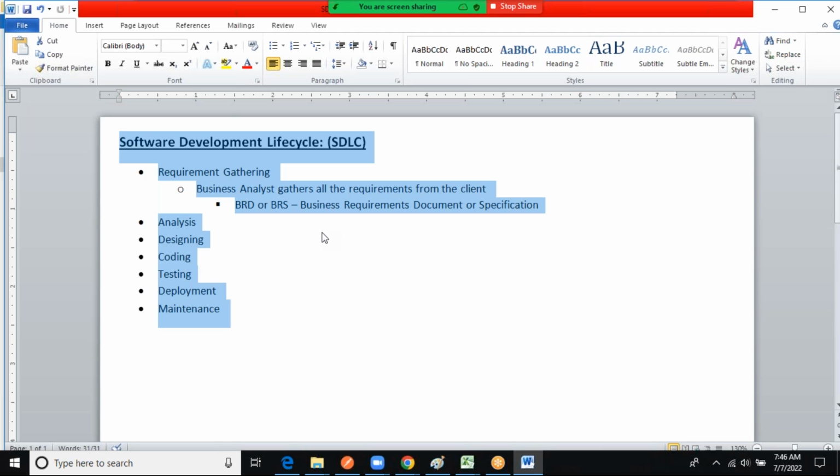If you are following the agile model, you will be working cycle by cycle, and each cycle is called a sprint. The sprint duration will be 2 to 3 weeks. Consider you are working for 3 weeks. In 3 weeks of time, only as much work as the team can do will be allocated by the business analyst to the team.